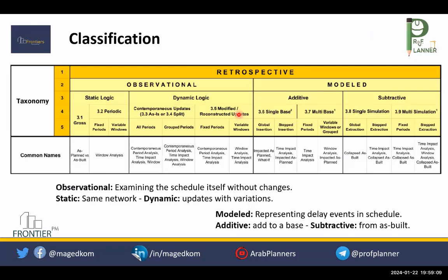You get the baseline and add the progress for different durations. If this is not required to analyze the case, you can use the baseline itself. It's based on the case, its complexity and the events.